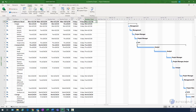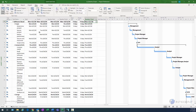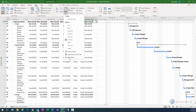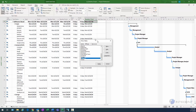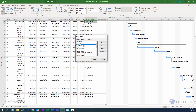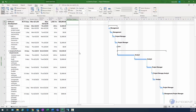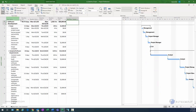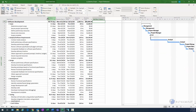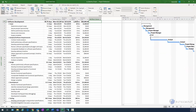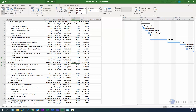Now I'm going to go to the view menu, switch to more tables, and select the baseline table. I'm doing this because I want a table that shows more baseline values. You'll notice it includes summary task aggregates, so we can see things like baseline working hours aggregate and baseline cost aggregate across different areas of the project.